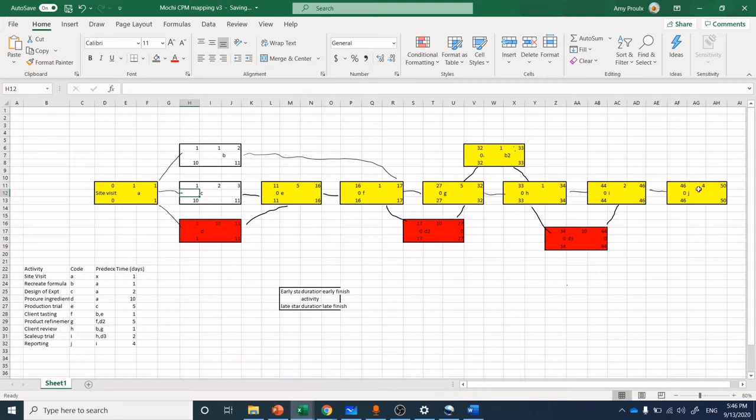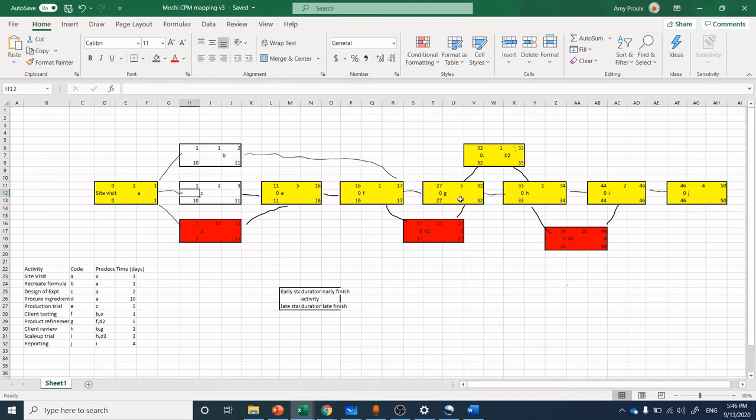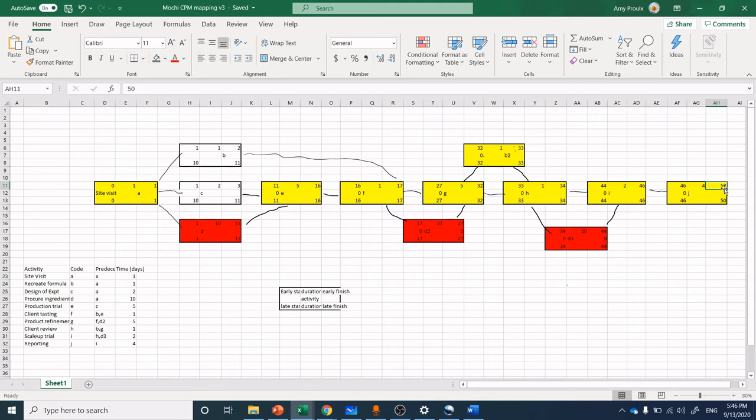Everywhere that it was zero slack, I highlighted it. That means that these activities absolutely, absolutely, absolutely, absolutely must move on schedule. And they cannot be budged by any means in terms of the timing to be able to get that project done by day 50. And as such, it's really, really critical to stay on schedule and complete everything on target. I put red here in particular. These are highlighted zero, but I want to put out an alternative scenario into the world here.